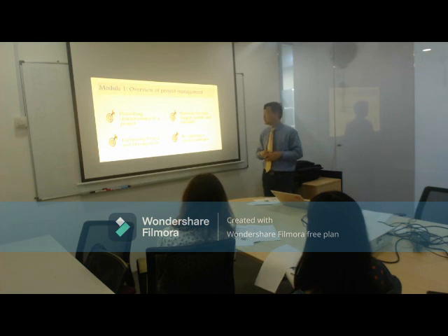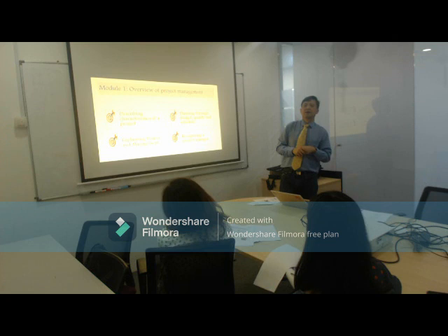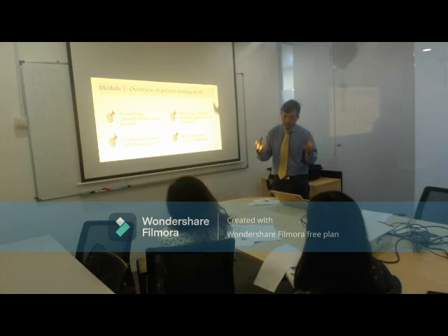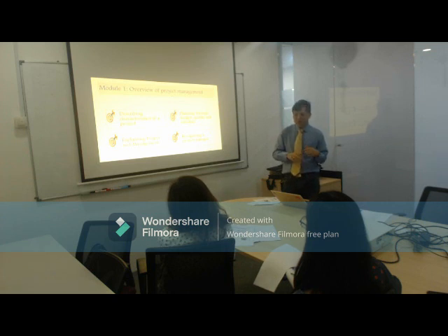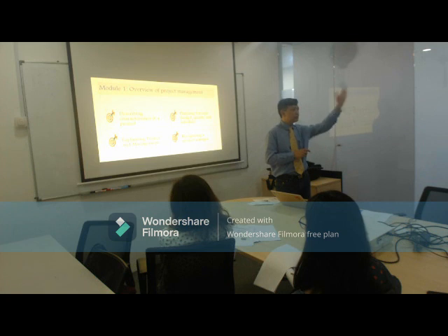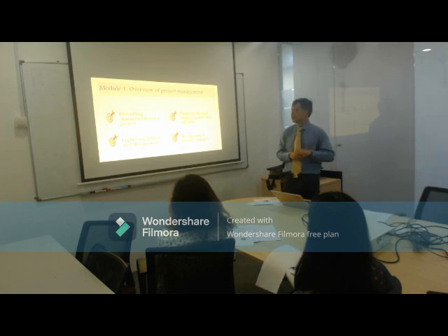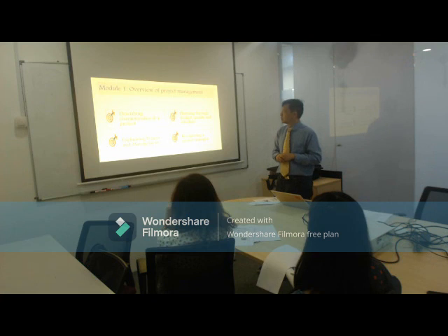For example, we may need to determine a budget for it. In other words, how much is involved, how much paint we need to buy, how much of other materials I have to buy, whether I have to pay somebody to move things out while I paint, whether I have to rent another place to put all the things, whether I have to pay a painter to do the painting.